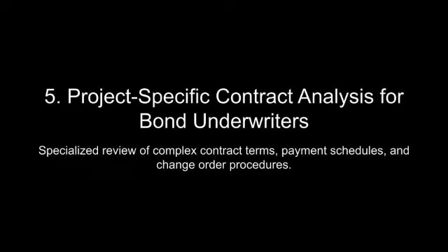Payment terms in subcontractor agreements are another critical area of focus. Most contracts utilize either pay when paid or pay if paid clauses, which dictate the timing and conditions of payments to subcontractors. Under a pay when paid clause, the subcontractor is entitled to payment within a reasonable time frame after the primary contractor receives payment from the project owner. In contrast, a pay if paid clause makes subcontractor payment contingent upon the primary contractor being paid, effectively transferring the risk of owner non-payment to the subcontractor.